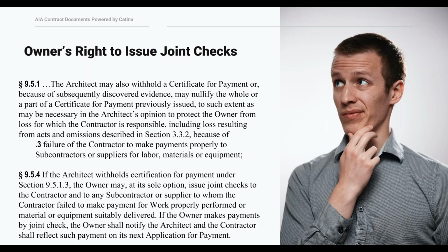I have been on a handful of projects where this provision was implemented. It's where the owner had very, very good cause to believe that money wasn't properly being paid to subcontractors despite representations and payment applications. So yes, I have seen owners rely on this and start issuing joint checks.